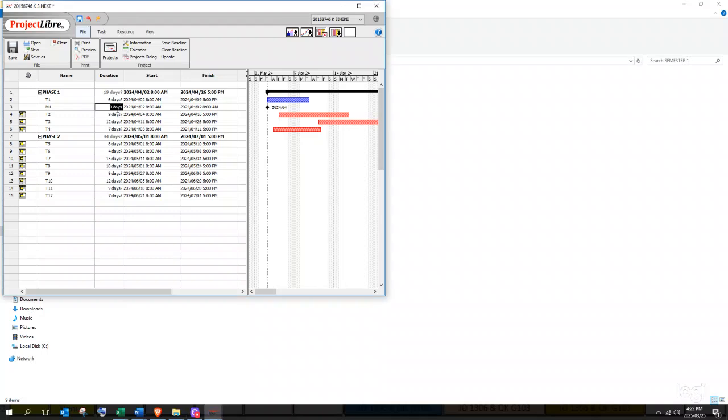So you've placed your 0, and then your start and finish time for your milestone is always the finish time of the task on which it depends. So it's the 9th of April. The finish time will be exactly as your start time, and it will come automatically. But you always need to double check.